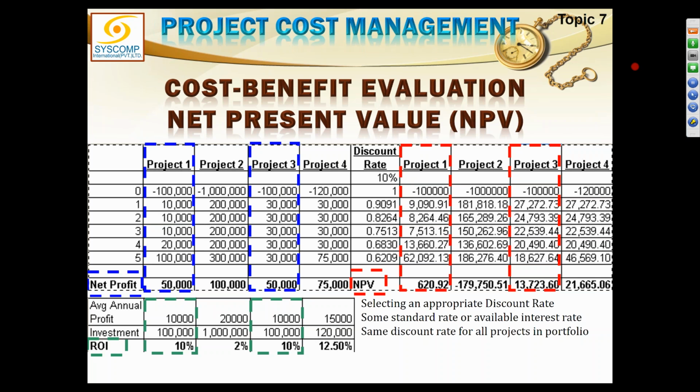Right? So if you are analyzing your business investment according to NPV, then you are highly flawed. Although it did give you a clear picture that you should not be making less than the State Bank's discount and interest rate, because if you are making less than that in your business, then you should actually be investing your money into a bank account. But generally businesses will make much more than that, and your business should also make much more than that. Therefore, we will move on to another method, and that is IRR, internal rate of return.